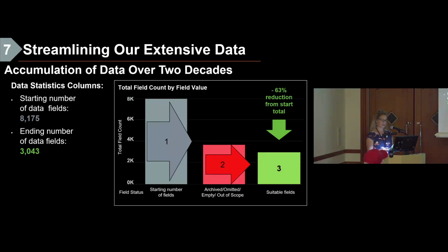This is a significant amount of data to move into a new system. So our first step was to assess whether all of it needed to be migrated. We established clear criteria for reviewing and filtering the data during the initial phase of the migration pipeline. This process identified fields with no future value, such as duplicate data or system-generated fields, fields related to organizational processes and permissions, allowing us to remove them before the complex transformation and mapping stages.